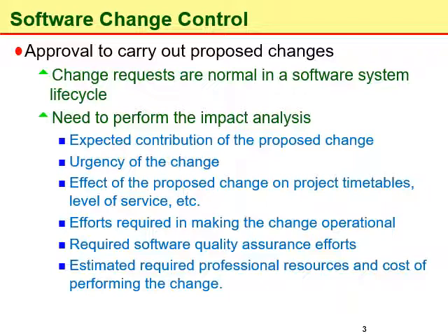So these items include the expected contribution of the proposed change, that is, the impact analysis team needs to see, for example, how beneficial the change is for the operations of the organization. Similarly, the urgency of the change, that is how urgent it is to accommodate the change.